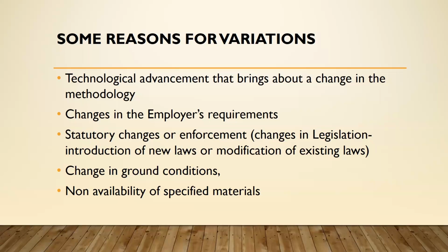Then we also have changes in the employer's requirements. The employer may decide that instead of using surface dressing, maybe I'm now changing to asphalt. And this may be detrimental, I mean, there will be cost overrun.